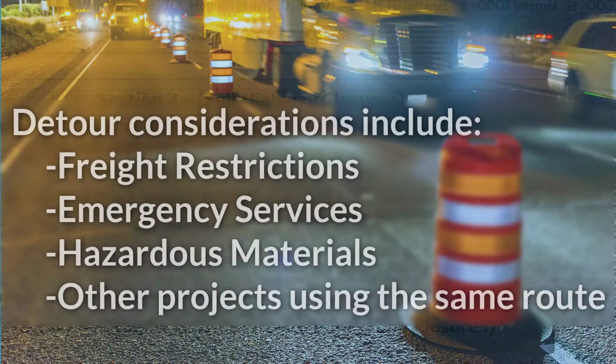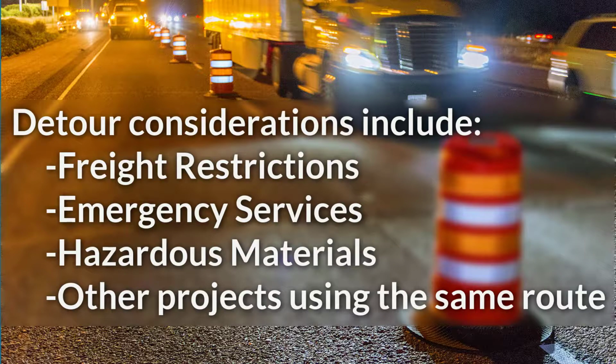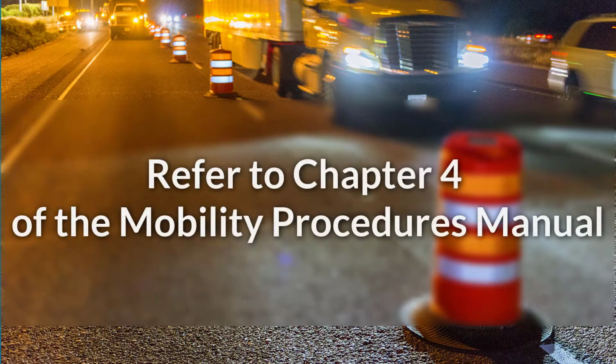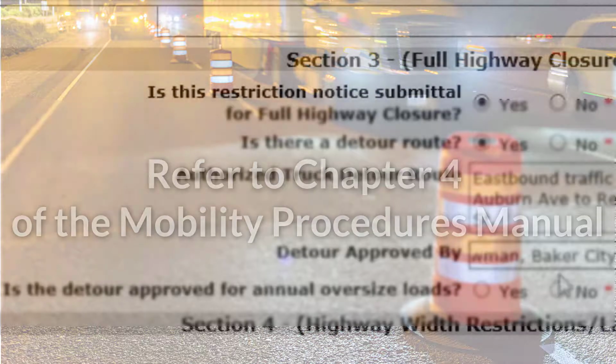Keep in mind that detour routes need to be vetted for freight restrictions and other factors such as emergency services, hazardous materials, and other projects that might be using the route. Refer to Chapter 4 in the Mobility Procedure Manual for information on selecting and evaluating detour routes.